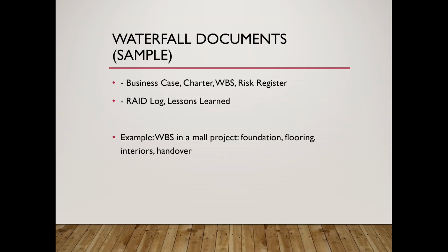Typical waterfall documents include the business case, charter, work breakdown structure, risk register, RAID logs, and lessons learned. For instance, in a mall construction project, a work breakdown structure might break the work into foundation, flooring, interior, and then the handover stages. These documents provide traceability and ensure accountability.